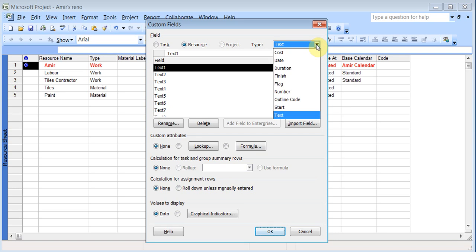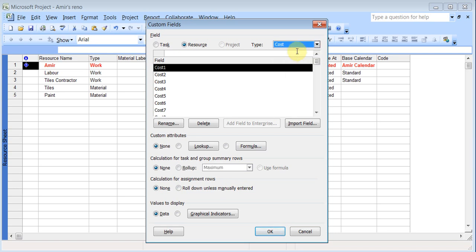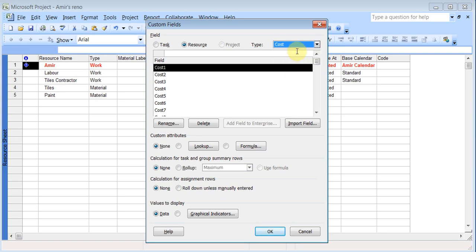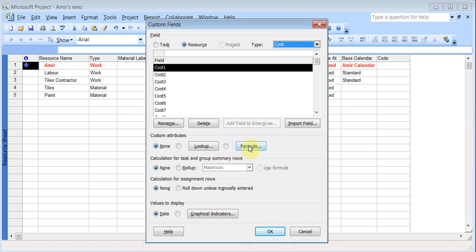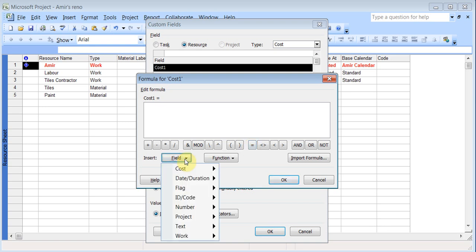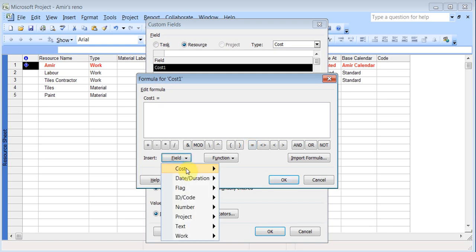And this time I need something with cost. So it automatically goes to resource. And cost one I do a formula. And I want to do cost multiplied by 13% tax. So I can do 1.13 which will give me the total cost plus the tax. So I can click here. Cost. And there is cost.